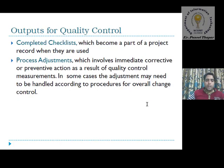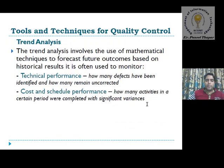Next is completed checklist — after the checklist tool is identified, we will have a complete checklist confirming that the product is qualitatively checked and controlled on the identified parameters. Process adjustment involves an immediate corrective and preventive action as a result of quality control measurements. In some cases the adjustment may need to be handled according to procedure or overall change control. We adjust processes based on what is required according to quality parameters.